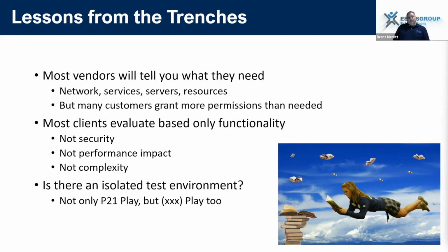Is there an isolated test environment? Not only P21 play, but test, play too. I mean, we have a customer that has, say, six environments. So, you know, they test and test, and then they move it to play and have people utilize it, see if it's going to work, and then they put it into their live environment, and it's all scheduled out.